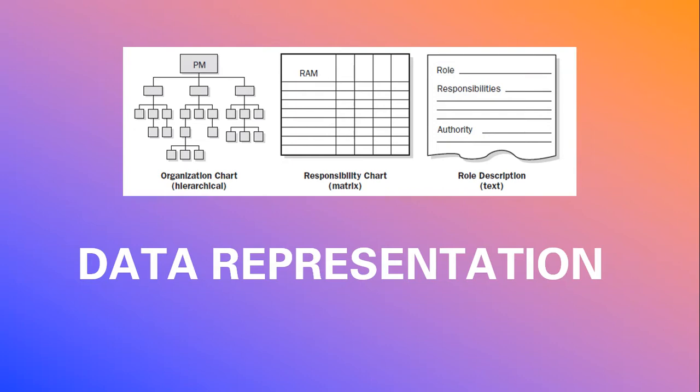The traditional organizational chart structure can be used to show positions and relationships in a graphical top-down format, like work breakdown structure, organizational breakdown structure, and resource breakdown structure. Whereas RAM, the responsibility assignment matrix, shows the project resources assigned to each work package. It is used to illustrate the connection between work packages or activities and the project team members.